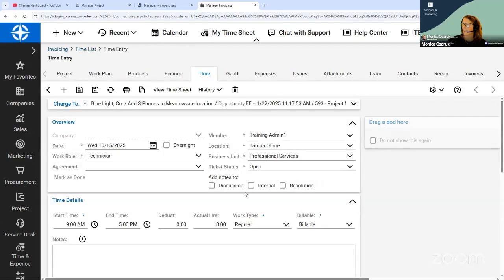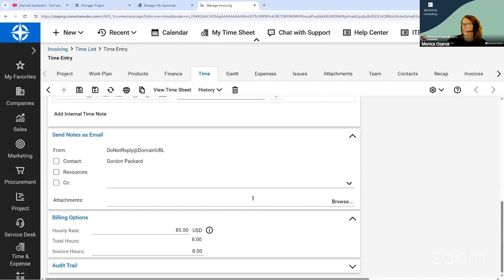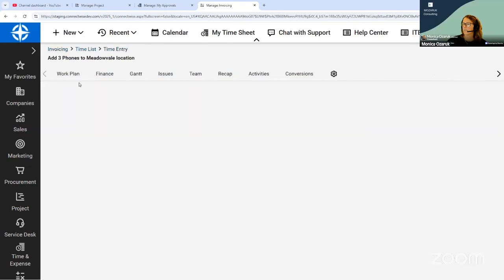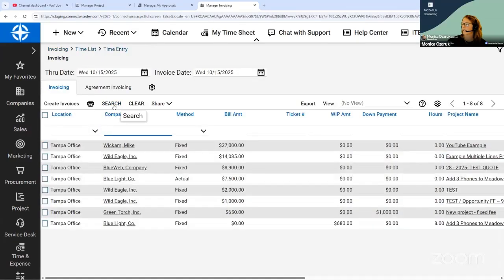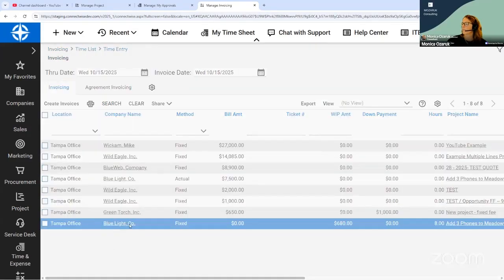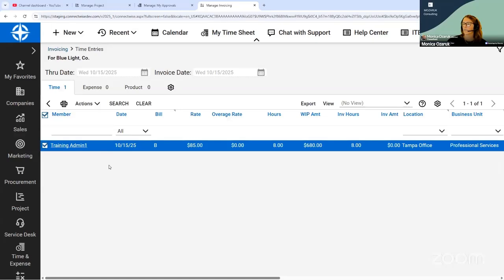and double check it. Okay. So now we have this right here, which is the time. You're the one responsible for billing. You come in and you see that the invoice hours right now are 8 hours. This is incorrect. It's a new tech. They took 8 hours. This is a time and materials project, and you don't want to bill out 8 hours to the customer. They would lose it and they wouldn't pay the invoice.